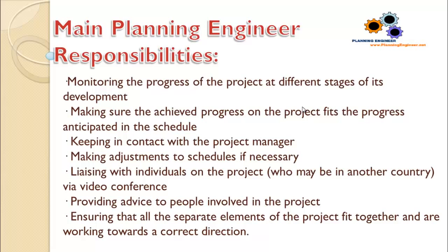Provide advice to the different people involved in the project, like advising the procurement department that this material needs to be delivered on this date in order to execute the following activity by that date. So this is one example. Another example: advising the construction manager what they should do this week or in the coming two weeks. We call it a two-week look-ahead schedule. Maybe advising the technical office which shop drawings should be completed. We will see in the coming lessons how to prepare a shop drawing list, and this is linked with the project activities.